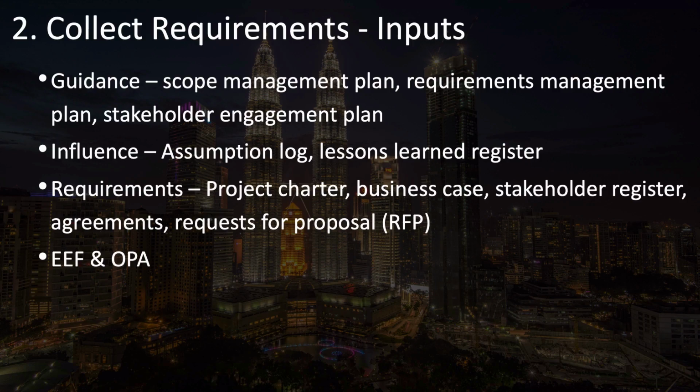Your lessons learned register, if this is your first time through collecting requirements, then you won't necessarily have much, if anything, in the lessons learned register yet. But if this is an iterative or agile, adaptive sort of project, and that's the development lifecycle that you've chosen, then you'll be revisiting requirements frequently. And the lessons learned register will help you to see what is and is not working on the project as far as collecting requirements at each of these stages or iterations.